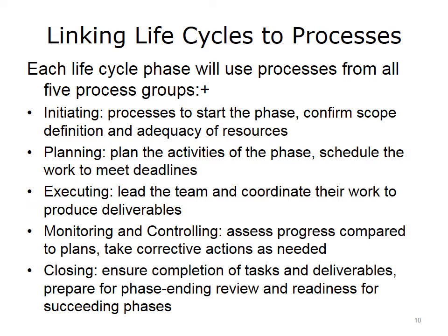Within a phase, you can call on processes from the planning process group to help you plan. Certainly, part of every phase involves execution, and there are processes in the executing process group that you can call upon to coordinate the work of the team. There's a process group for monitoring and controlling, and you'll certainly want to call on that process group to assess the progress during a phase, compare it to the plans, and take corrective actions as part of your controlling activity.